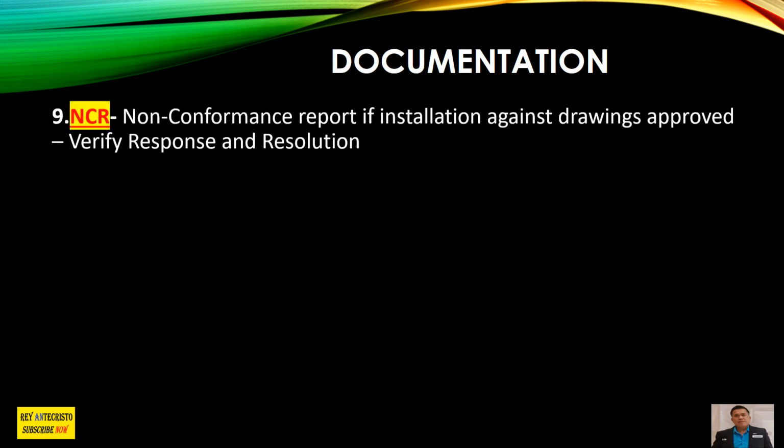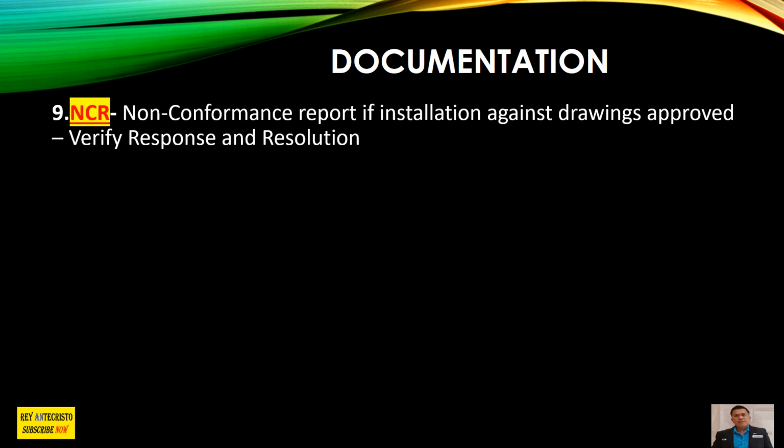And we proceed to number 9. Number 9 is NCR. What do we mean by NCR? This is a non-conformance report. If installation is against the approved drawing, verify response and resolution, this is under the quality department,